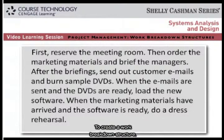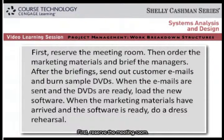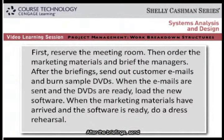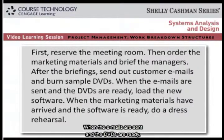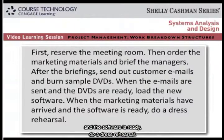To create a work breakdown structure, you must study the project very carefully. For example, suppose your team leader asks you to handle a software launch and gives you these instructions. First, reserve the meeting room. Then, order the marketing materials and brief the managers. After the briefings, send out customer emails and burn sample DVDs. When the emails are sent and the DVDs are ready, load the new software. When the marketing materials have arrived and the software is ready, do a dress rehearsal.